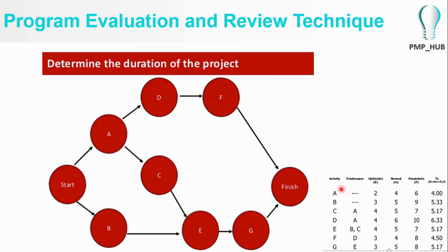So A and B kickstart from the project activities. Activity C follows A directly. Activity D follows A directly. Activity F follows D directly. Activity E follows B and C. And activity G follows E, and then it goes to finish.